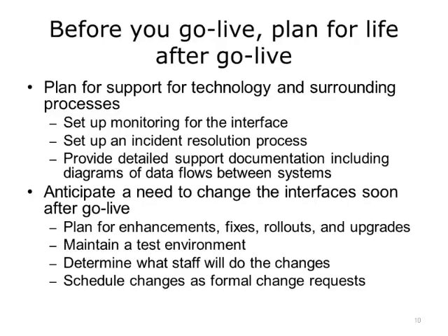Successful production life of an interoperability implementation needs to be planned for. Plan to assure that your implementation will be well supported. Make sure the technology and the surrounding processes will be supported. Make sure there is support technology and staff in place to ensure that the interoperability will continue to work and that service disruptions will be quickly detected and restored. Provide detailed support documentation, including data workflow diagrams, and make sure there is monitoring configured and an incident resolution process in place.